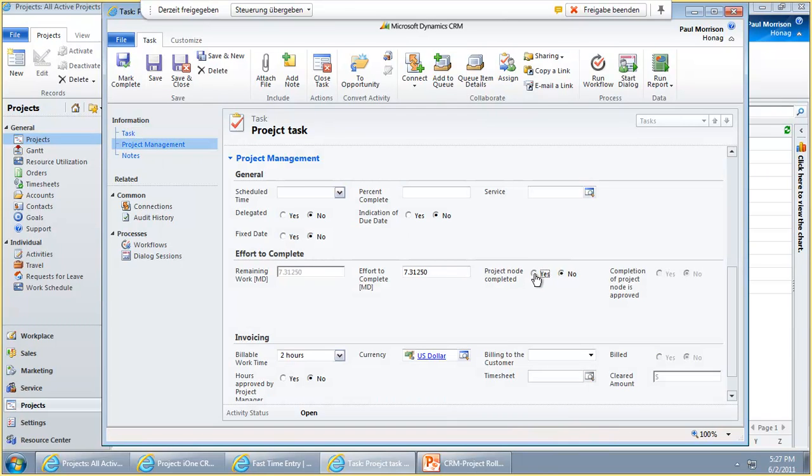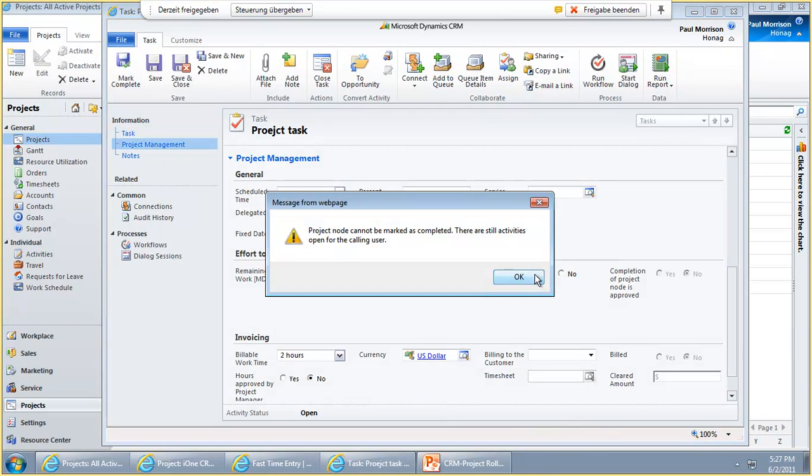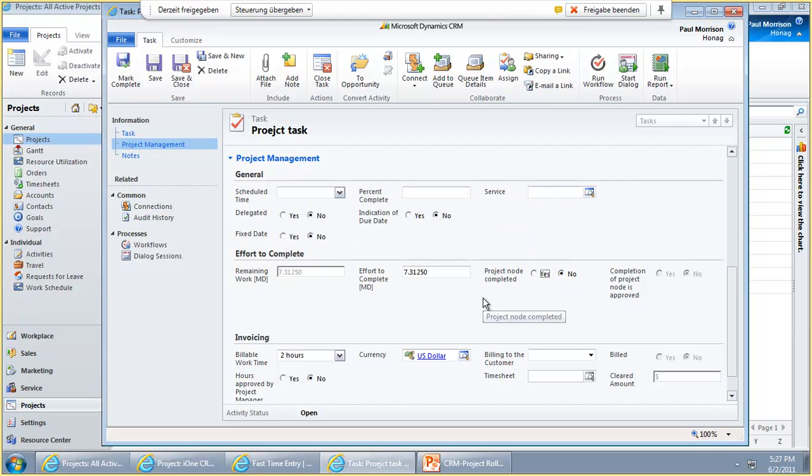The system checks for me if there are additional tasks. The system now checks, okay there are different tasks for my project for my user available, so I cannot close this project node.